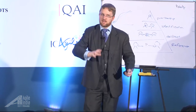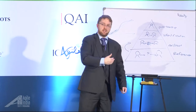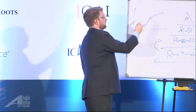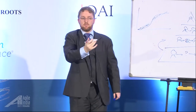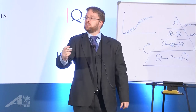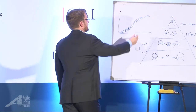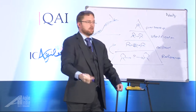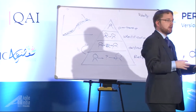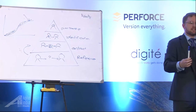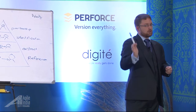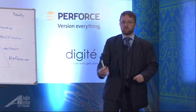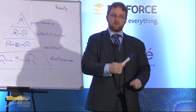Then we're going to see business value behave differently. At the beginning of any piece of work, the business value we're producing is probably not going to be greater than our cost — because we're doing back-end stuff, infrastructure, downstream work that doesn't have high business value. At a certain point we'll cross this threshold; the earlier we do it, the better. When we cross it, we start adding a net positive value in terms of what we're delivering. There is a natural point where high-value, low-effort capabilities have been created and the project is no longer quite worth doing — that is the natural point for a time-materials-based contract to end.